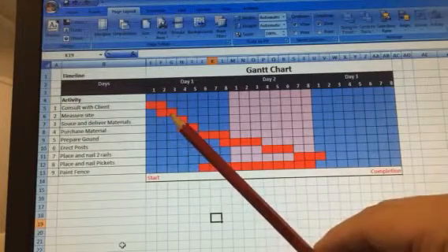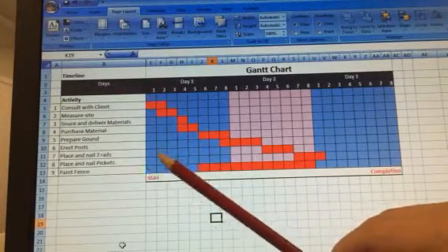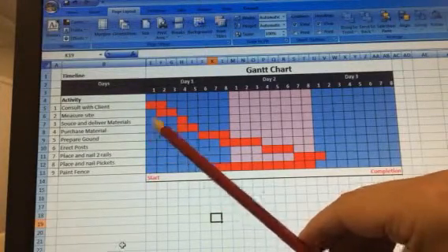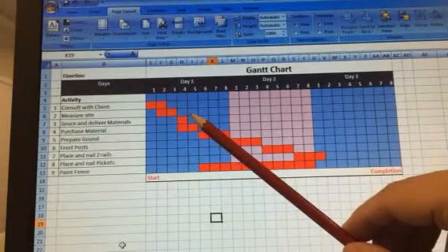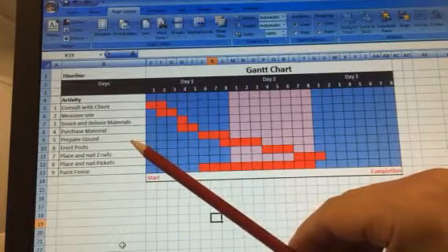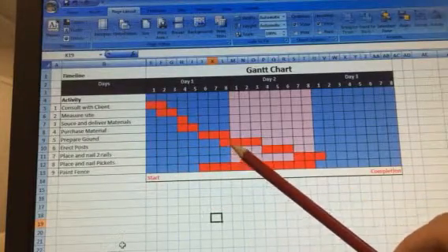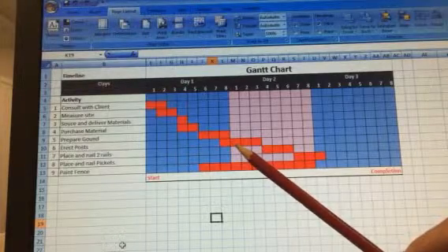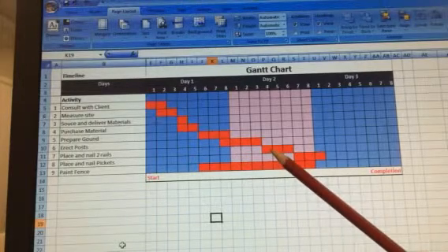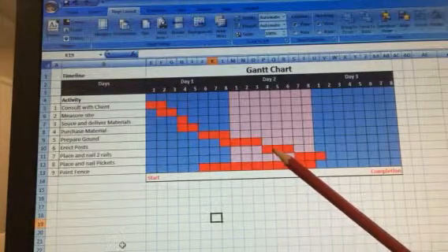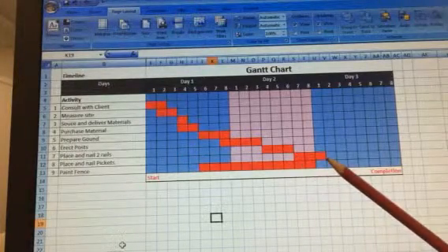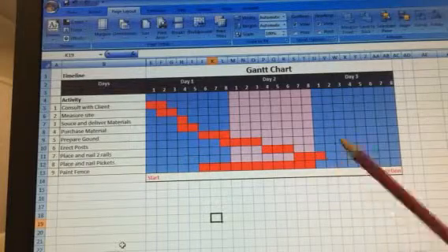And when you presumably give the client a quote, they'd agree to your quote and you'd move forward. Also sourcing and delivering materials and purchasing material, some of that could happen at the same time, and of course waiting for the delivery of the material to the property. Then you start to prepare the ground and erect the posts for the fence. Some of that could be done concurrently, then place the horizontal rails and nail those onto the posts, and the last bit there is to nail the pickets on the fence.